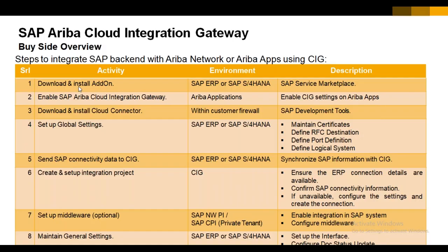In some cases you have only the scope of commerce automation. In that case, you may have a smaller team size. Or in some cases, if your scope is larger, for example, you are going to implement other features as well, then your team size will increase. So why do we require different team members here? Because each individual team member has to play their own role. Also, not all team members are required full time. So don't assume you require all the team members full time.